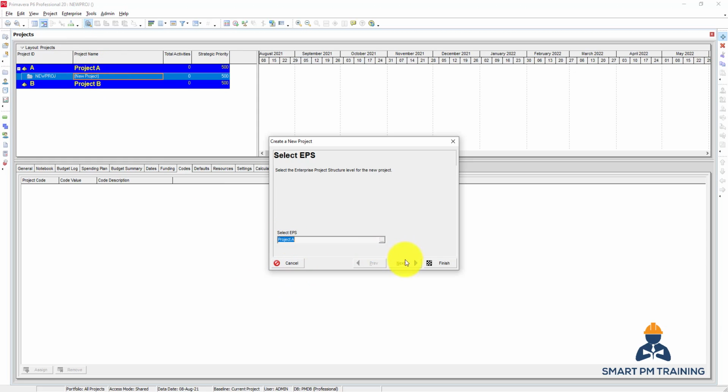It's up to you. So we will maybe create the baseline for project A. So this is our EPS. Click Next. Project ID, let's have it A for project A and BL for baseline. The project name, full project description, we can say project A baseline schedule.